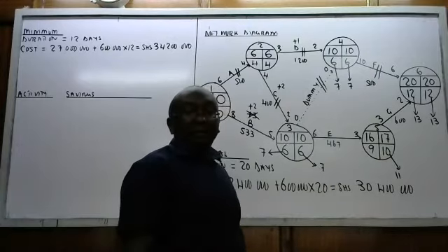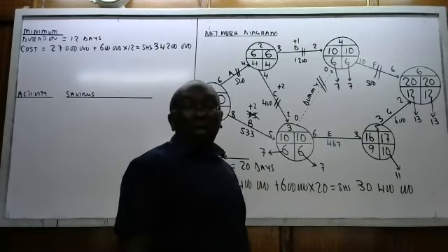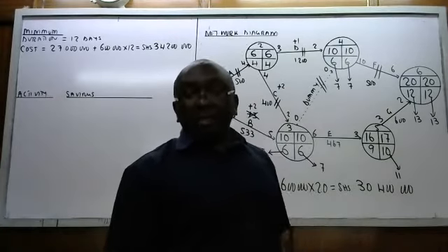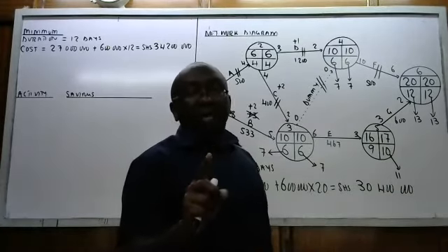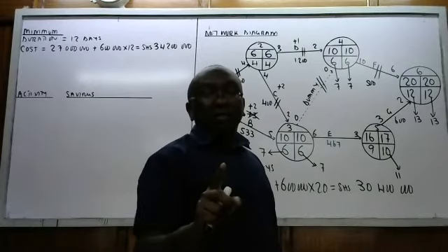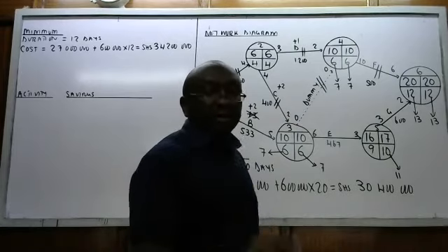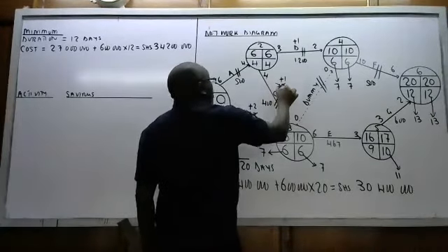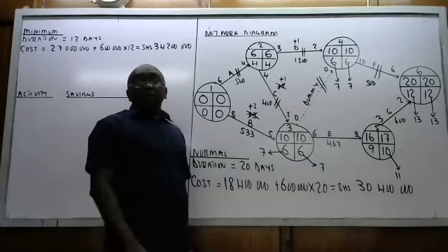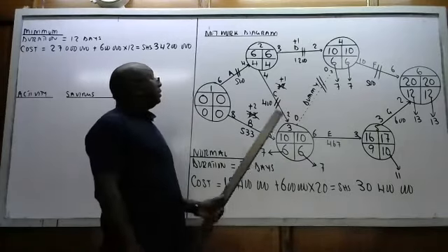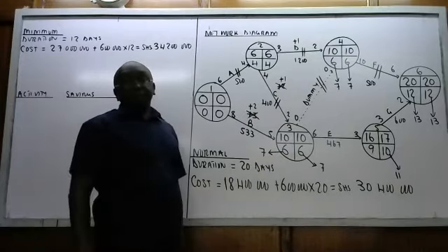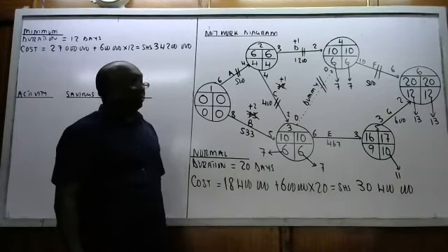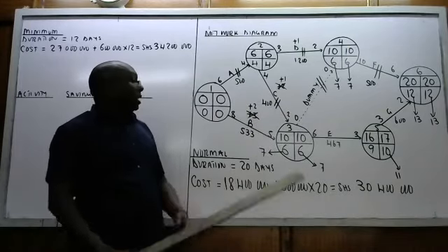Are we going to be late, and by how many days? Yes, by 1 day. We are late by 1 day because we added 2, so we were supposed to have added 1. We cancel this one and say add back 1. When you add back 1, this now becomes 7. So we are through with this. Damage, no problem.